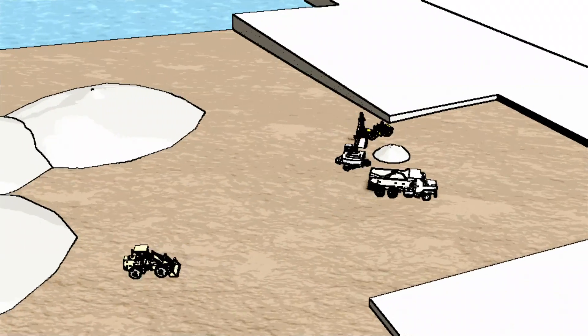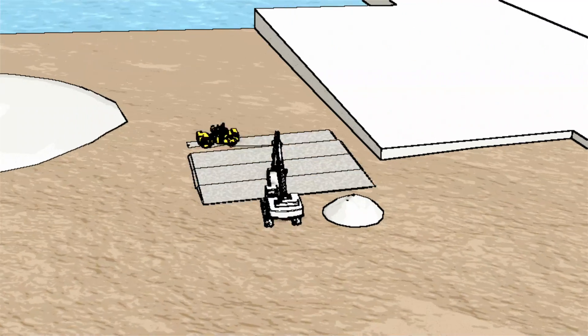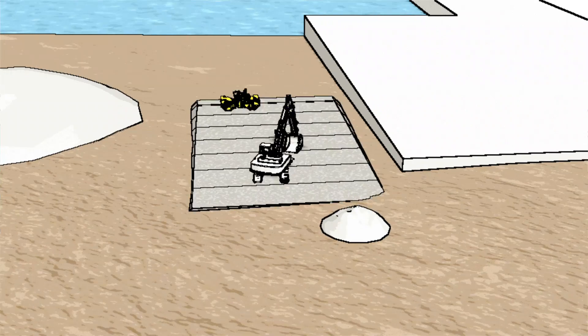Bund construction at the Northern End will be faster as the area is not strongly affected by river erosion, which will be minimized by geotubes.